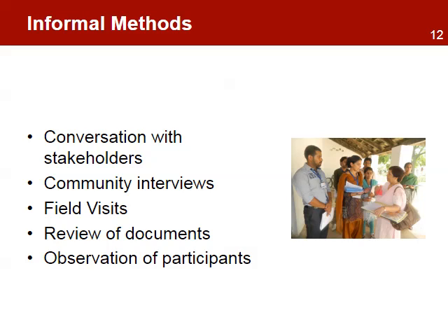Informal collection methods have little structure. They include conversation with stakeholders, community interviews, field visits, review of documents, and observation of participants. These methods are less precise, less expensive, and require less time. These methods are chosen when the project doesn't need frequent data. Most of these methods are also used to collect qualitative data when the project needs to have an in-depth understanding of some of the issues.